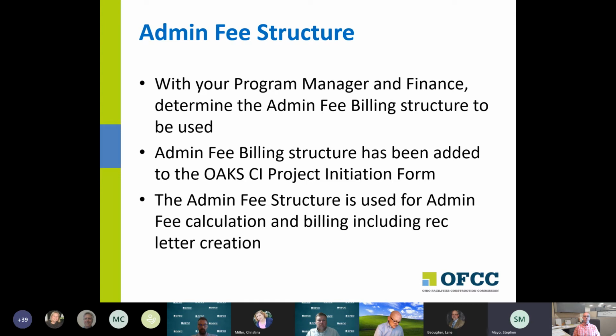Second thing, and this is the one that's agency only, admin fee structure. So with your program manager and finance, if necessary, determine the correct billing structure to be used. We talked about that in the earlier presentation. Admin fee billing structure has now been added to the project initiation form. That's something that Shauna did just earlier this week. So the new form that's out there will have that in it now.